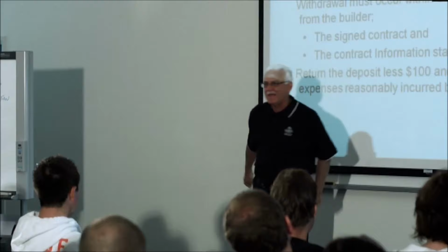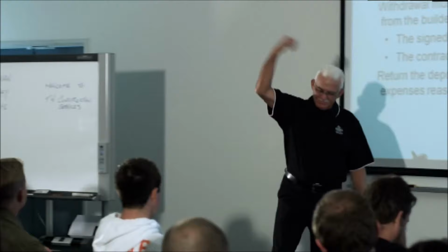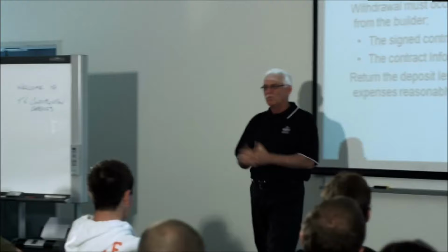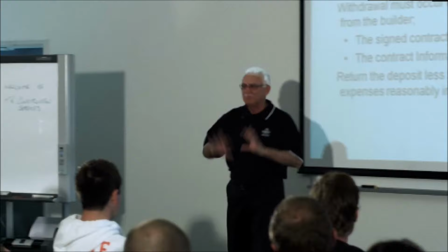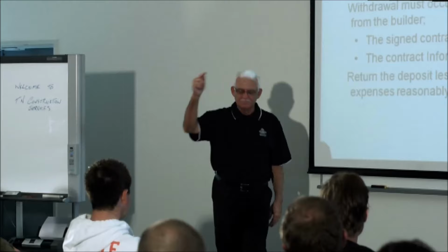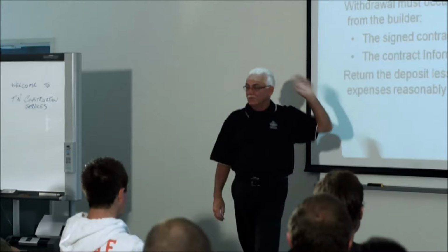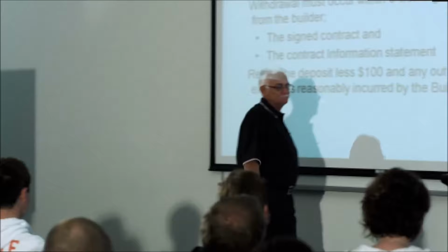Builders back in my day, that's what they did. They'd have cutthroat salesmen out there that had signed someone up, and then when they come back and say, oh, look, we've done our figures and we really don't think that we can afford it, we want out, I'd be sitting there saying, no way. I'm not that bad, but I know that builders out there used to do that. So again, the government brought in legislation to say that you must give the owner an opting out period. So that cooling off period is 5 days to stop us big nasty people from making little people get into a contract.